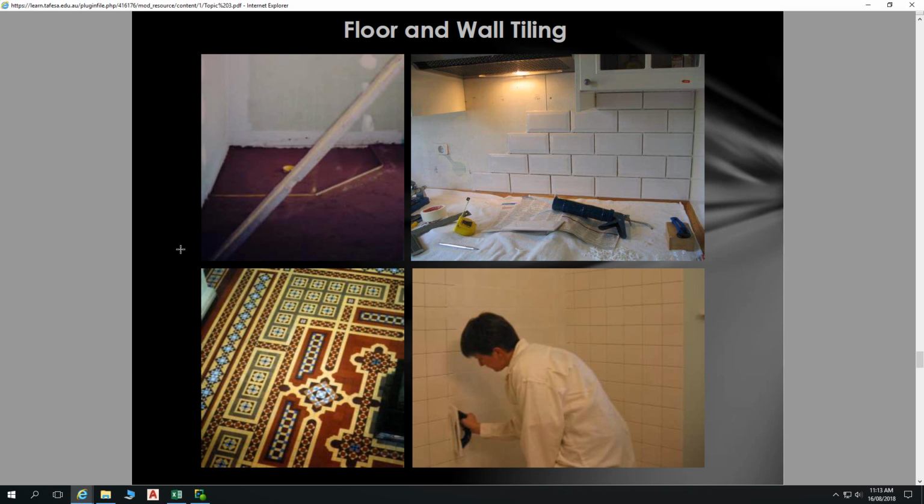My preference is for the waterproofing on top of the screed, because with your waterproofing under your screed, yes, you may have got that set down very nice and so on, but you do still get the retention of some moisture within that screed. I prefer the waterproofing on top and then turned down into your waste, like that. But yeah, two different approaches, and that can play into your scheduling as well, because we have to give time for that waterproofing to dry, and certainly give it time to dry before we go putting a screed on it or work on it with tiles.